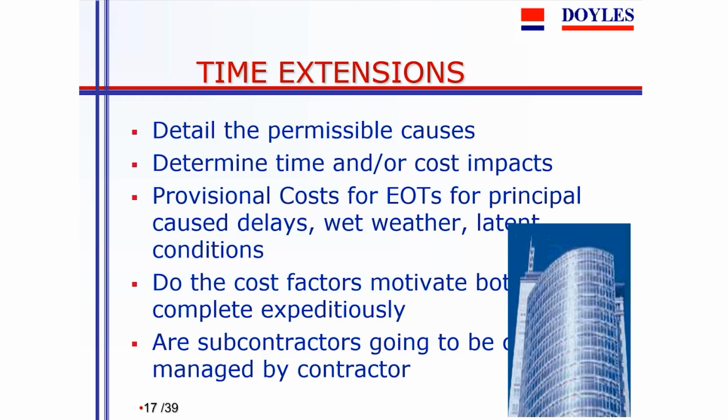So one aspect is, of course, that if you have, for instance, weather, and one contractor thinks it's going to be very wet weather, so he puts 10% on top of his bid, but another contractor who doesn't think it'll rain, doesn't think there'll be a weather problem, puts 1% on his bid. If you don't show some sort of recognition of how much everyone is adjusted for, you're often, from a principal's point of view, looking at apples and oranges when you're judging tenders.